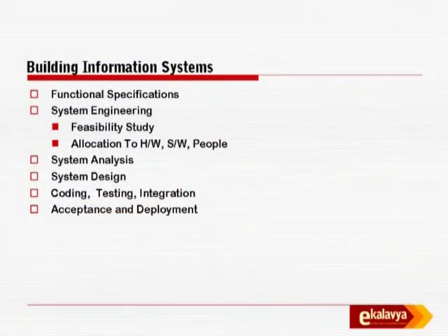So let's say you have got a requirement specification and you have decided that Tata Consultancy Services will develop that software. You have given all the specifications. Incidentally, when you do a system requirement specification document, at that time you have to specify how you will do the user acceptance test. You have given that, and Tata Consultancy Services have delivered the product after 6 months. Now you do not have internal capability to test the software from a user perspective. So you hire another company which says we specialize in testing, and they will send their people, they will understand your user requirement specification, they will prepare test cases and they will execute those test cases and certify to you that yes, this meets your functional requirement.